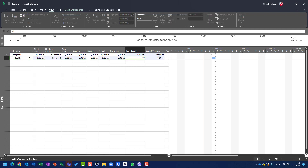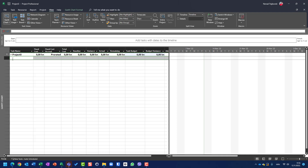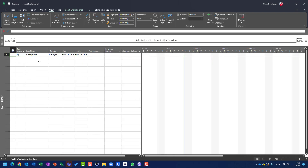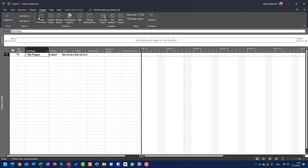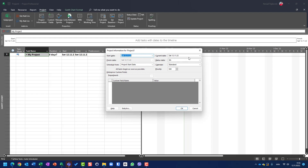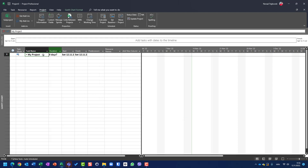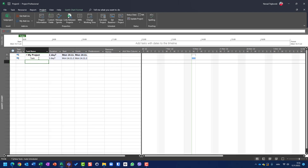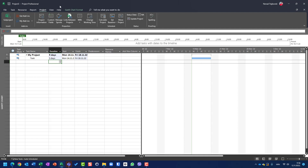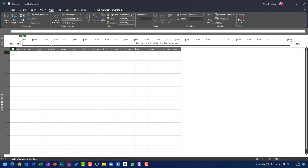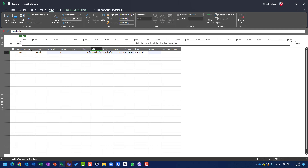Let me go step by step. I will go to the entry table. I have my project — it will start next Monday. Today is Saturday, so I don't want to start on Saturday. Let's go to Monday. Let's create one task and say it will last five days. Who is going to work on this task? Let's go to the resource sheet. John is going to work on this task — keeps things simple.